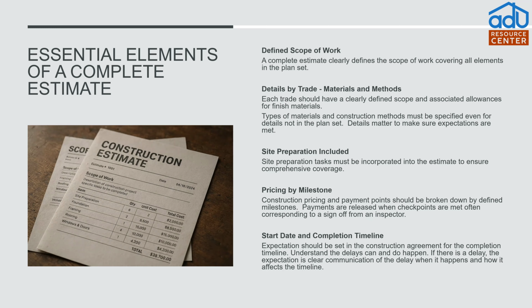So they do the demolition, they put down the foundation. The inspector comes out, signs off, done, perfect payment. Right. Next step, they do framing. Framing materials are delivered. You see the materials delivered in your yard. Great. Sign off, payment point. Framing goes up, then you see it's completed. Inspector comes, signs off, payment point. These are milestone payments. This is the best way to run an overall project.